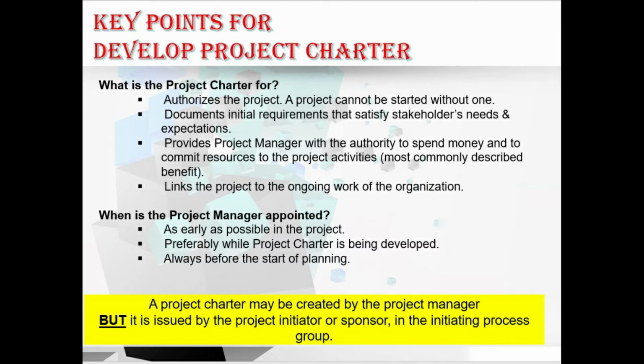Let's move to when the project manager is appointed. The project manager is appointed as early as possible in the project, and preferably while the project charter is being developed. And also, the project manager is appointed always before the start of the planning. Okay, hope you understood these two key points. And also, a project charter may be created by the project manager, but it is issued by the project initiator or sponsor, that is, it occurs in the initiating process group. Okay, hope you make a note of this point.